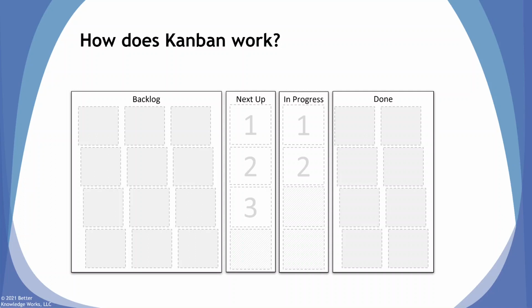In this example, we'll limit the number of tasks the team can complete in a week. And we're going to say that's normally about 3 tasks. And so you see here, we've limited next up to 3.